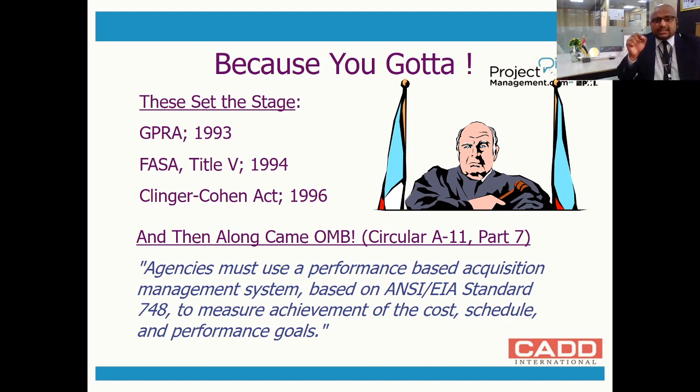It is required by law that every project management system should have a standard. It is based on ANSI standards to measure the cost, schedule and performance goals. If you are a project management company, you should have this particular technique. You should have a technique to measure the progress of your project. You should not have just any technique. It should be a standardized one based on ANSI EIA standard 748. This is mandatory.